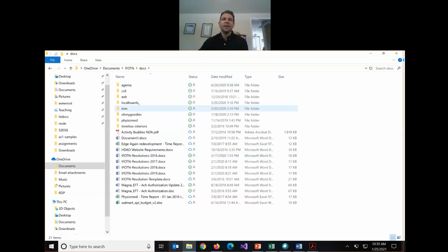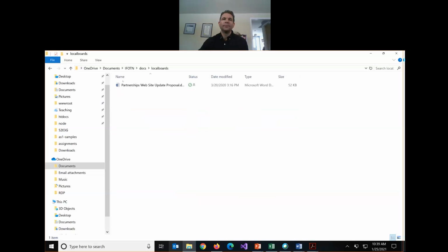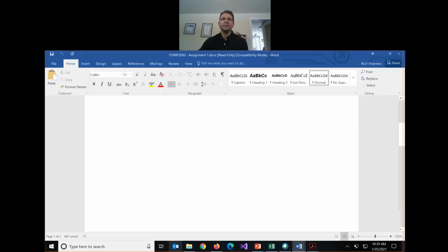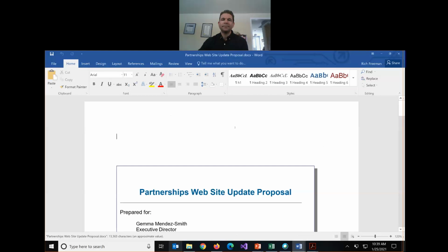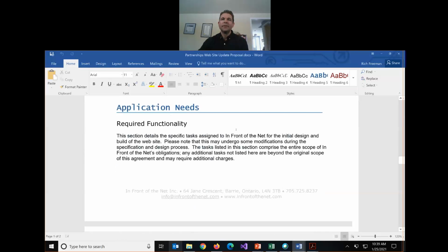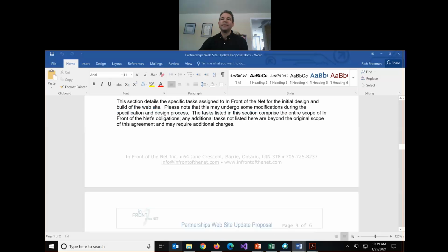Here's one thing. Let me just see, where do I? So in proposals, I actually typically put in a sentence like this: The tasks here are the entire scope of my company's obligation, and any task not listed here is beyond the scope and may require additional charges.